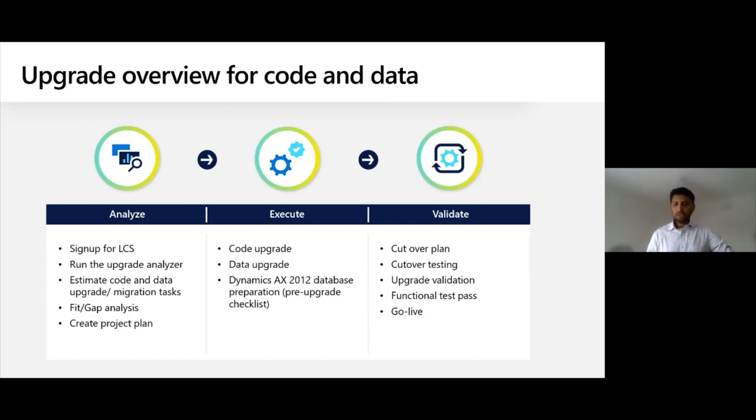The execute phase is when you will run through the task that you have planned through the analyze phase. At this point, you will switch your LCS project from preview subscription to an implementation project. You will identify the implementation project as an upgrade project because when you update the LCS project as an implementation project, you get several links supporting your upgrade process, which will be very helpful for you